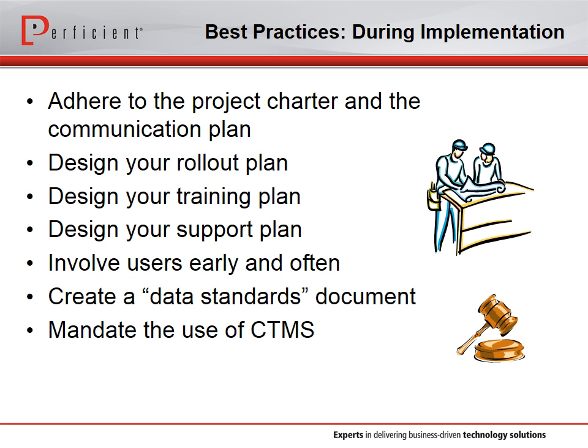So you have to manage around that. But also plan to have everyone who will be involved in test execution formally trained prior to testing. They don't necessarily need to be trained on the whole system, but at least training for test execution. So that's going to ensure a smoother testing process and minimize any anxiety in the testers. For example, if they don't know how to use the system and they struggle with some of the test steps, they may develop a negative view of the system and become resistant to adopting it. So the sooner the users are exposed to the system, the smoother the transition will be.